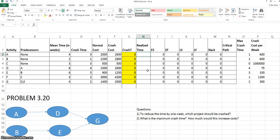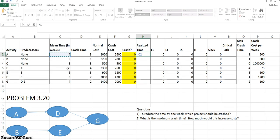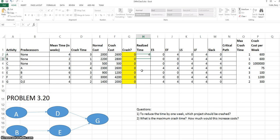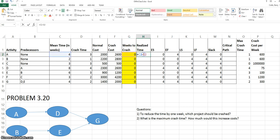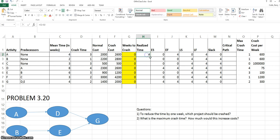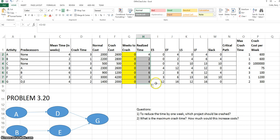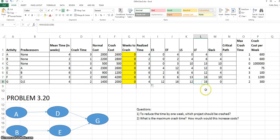The realized time to complete the project will be the mean activity time minus the crash time. So column G really contains the number of weeks that we are choosing to crash the project. This formula will be the same for all activities, so we can enter it on the first row and copy it down. Now that the realized time is populated, we can see that all of the other times for each activity are populated. And we can see that the largest latest finish time is 16. So right now 16 is our estimated completion time for the project.